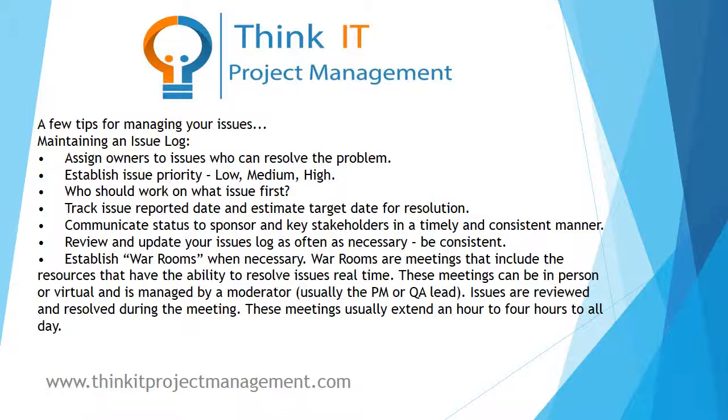That individual will be coordinating the issue resolution process, where you assign issues to someone who can fix it, you track the progress, you update your issues list, you make sure that issues list is posted where key stakeholders and your sponsor have access to it, so that they can see either the progress that you're making or the challenges that you're having.